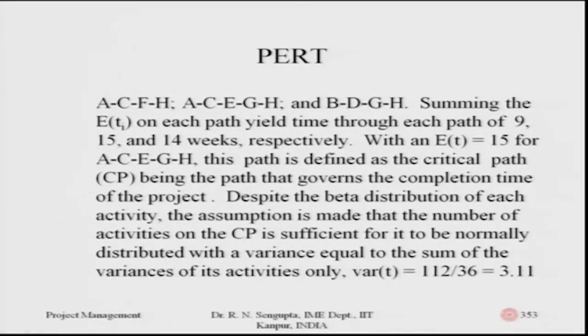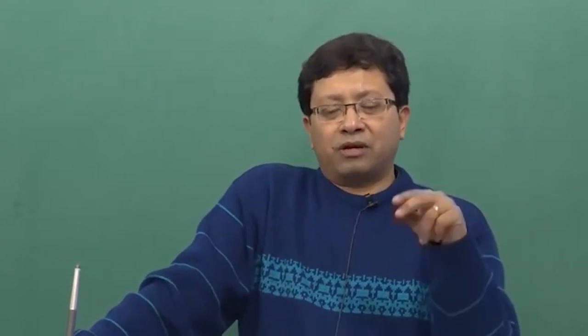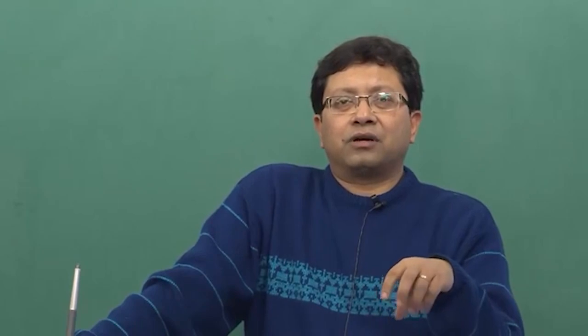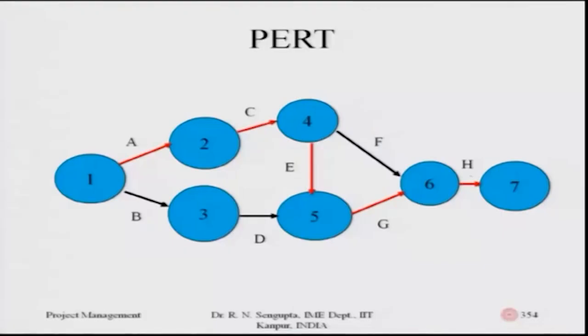Despite the beta distributions of each activity, the assumption is made that because the number of activities on the critical path is high, we can apply the central limit theorem. The variance of the critical path is found by summing the variances of all activities on the critical path; the standard deviation is then the square root of that sum. In slide 353, the activities on nodes are converted to activities on arcs with one starting node — the critical path A-C-E-G-H remains the same.